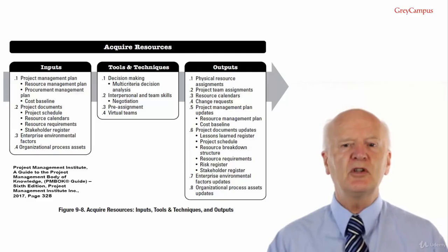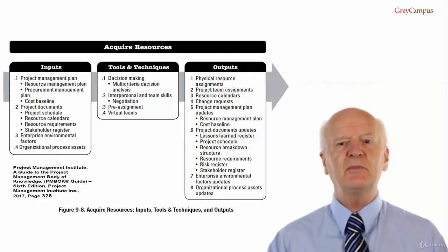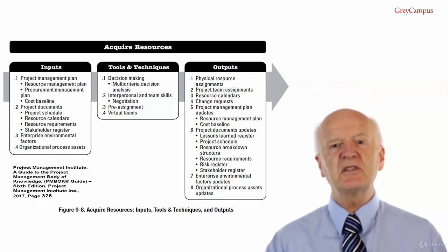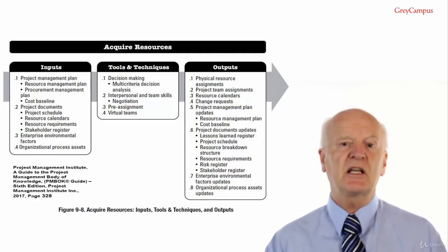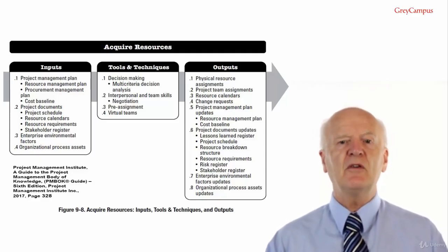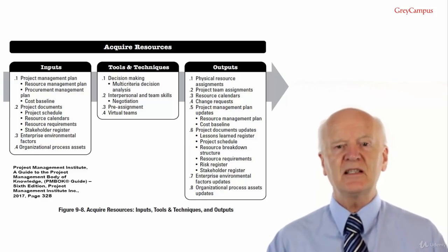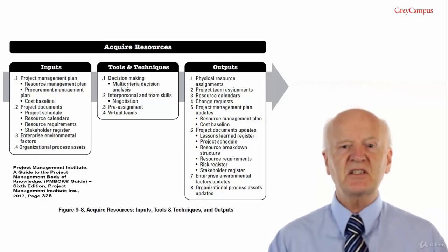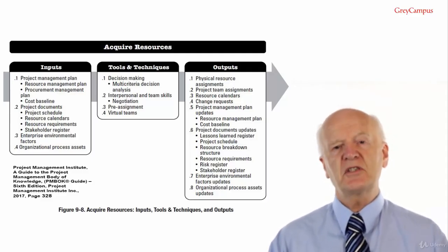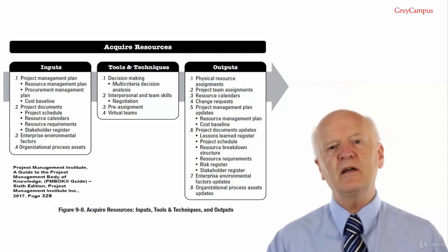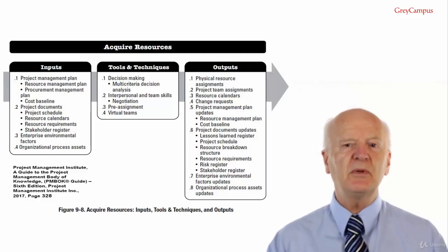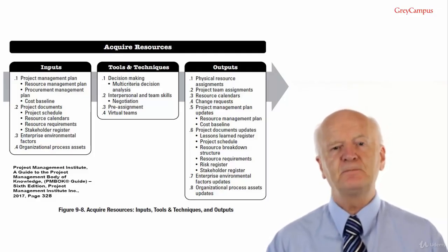If you're not familiar with procurement, you can easily fall into the trap of thinking that you can actually procure things as you need them. But many resources, especially people, can have significant lead times. In the Australian Public Service, for example, from the time of identifying the need for a person to the time that person is actually sitting at a desk is typically around 6 weeks. And a slightly non-standard personal computer can take 4 weeks or longer. You need to be aware of all these lead times so that you can begin the procurement process in time.